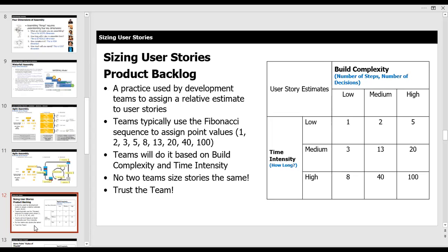Effort is, how much time is it going to take to do this piece of work, whatever that piece of work is. There's no schedule against it. Once you add schedule against it, then it becomes duration. But just the basic concept of how long does this take to do a piece of work. And then later on, you come back and you decide how risky it is. What's the risk factor involved with this?